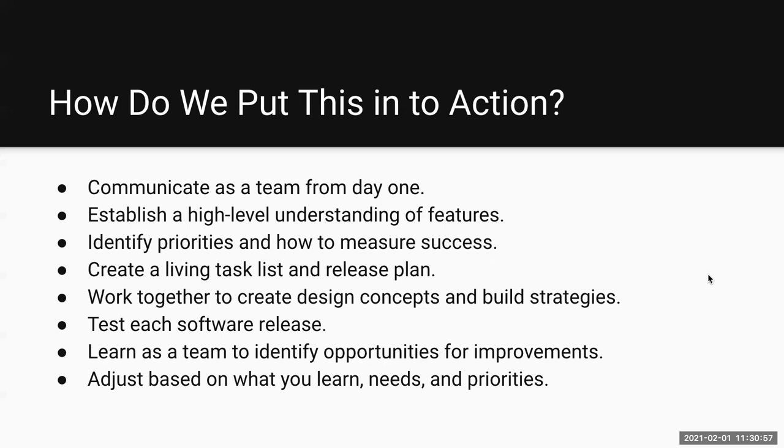You also want to try to find ways to learn as a team, identify opportunities for improvements. Every person has a different perspective on what an improvement looks like. This could be a technical improvement. This could be a usability improvement. This could be an information or content improvement. And not all of them need to happen. Just because you identify an opportunity doesn't indicate any sort of a commitment. It just goes into the backlog and you prioritize as needed.